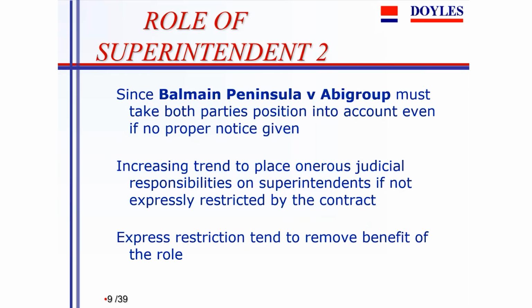And given that he had an even-handed responsibility to both parties, and he knew that there was a proper basis for an extension of time, he should have granted that extension of time, notwithstanding the contractor had not applied for it within the time period specified under the contract. The courts agreed with the contractor on that occasion and said, well, the superintendent did have the opportunity to provide it and he should have provided it.